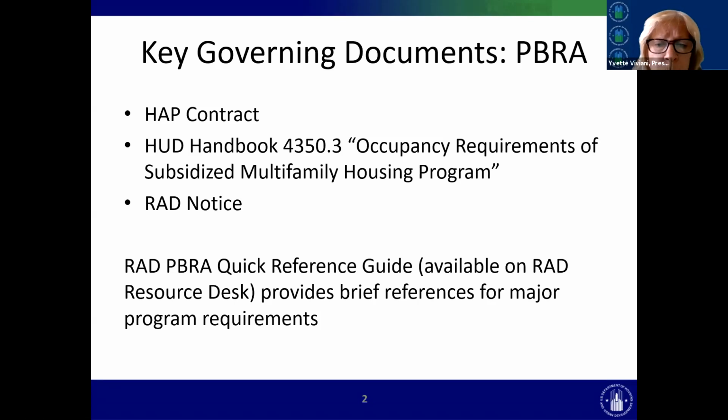We have the program set up whereby you will receive a sum of money for each of those units until the rehab is completed. So there's a rehab assistance payment listed in that section in part 2, as well as a time period for which you're eligible to receive those. Okay, so again, these are a few critical elements to the document that we really need to have in place, correct at the closing date.